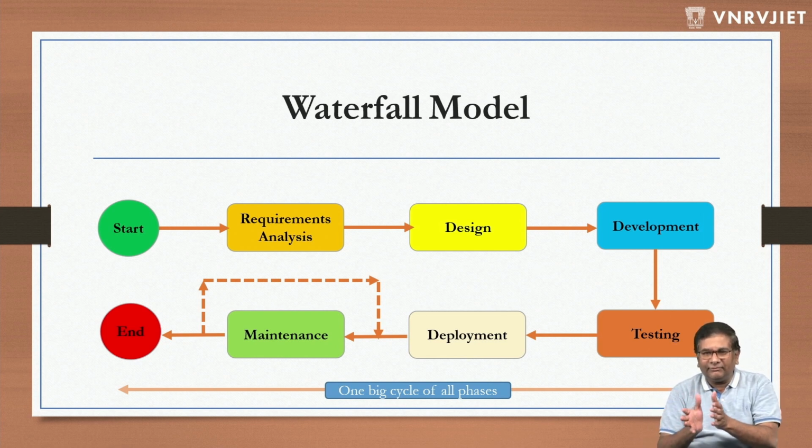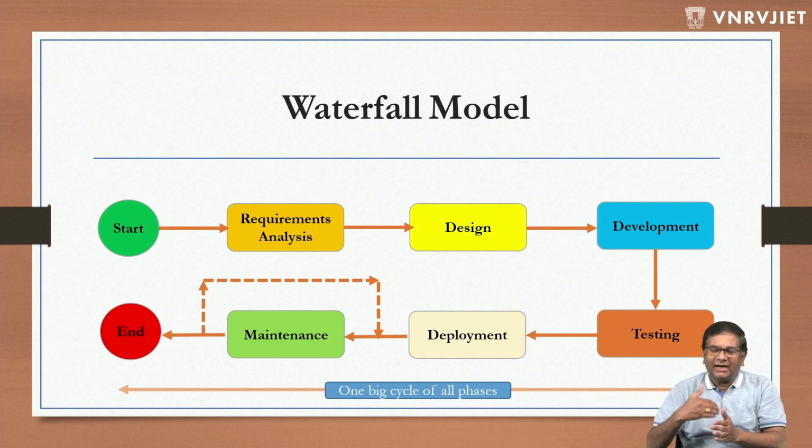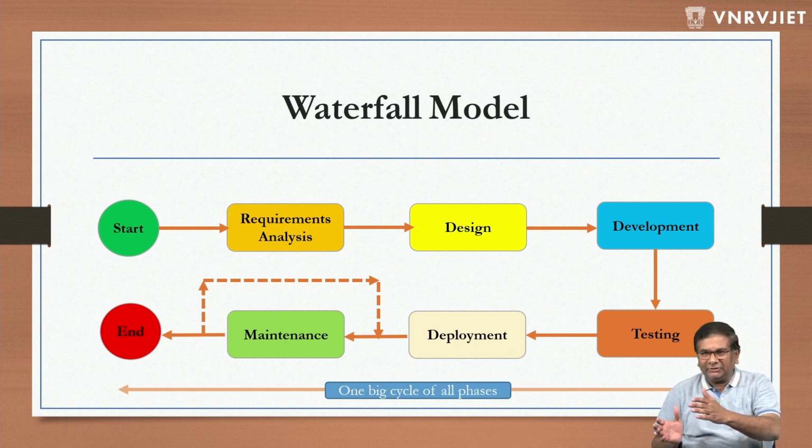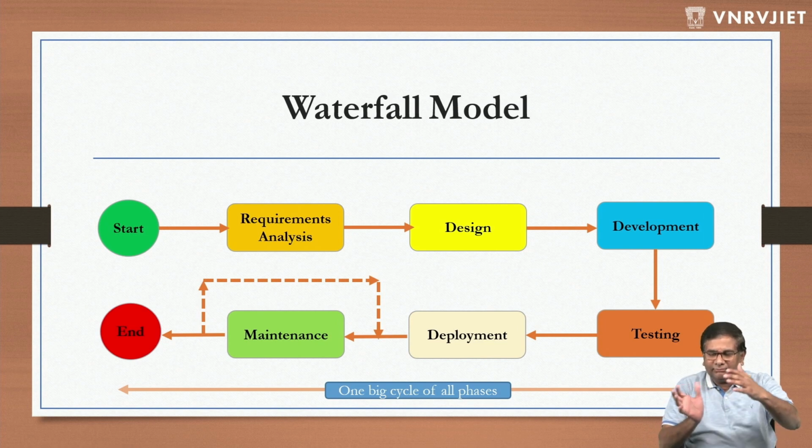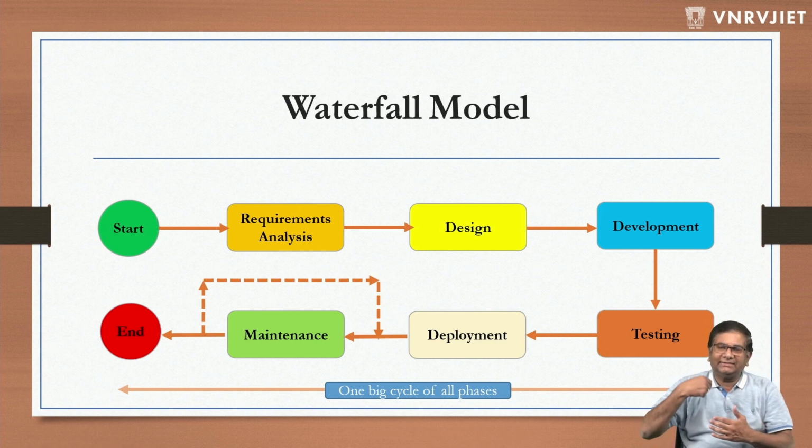Once the technical design is done, they might also work on the development along with the developers. They finish their individual modules. Once all the individual modules are completed, the testing team gets involved. The testing team will start testing individual modules, and they see if they are working as per the expectations. Once all the modules are working, they integrate all the modules into one single software and they test it as the entire thing. That is called the integration testing.